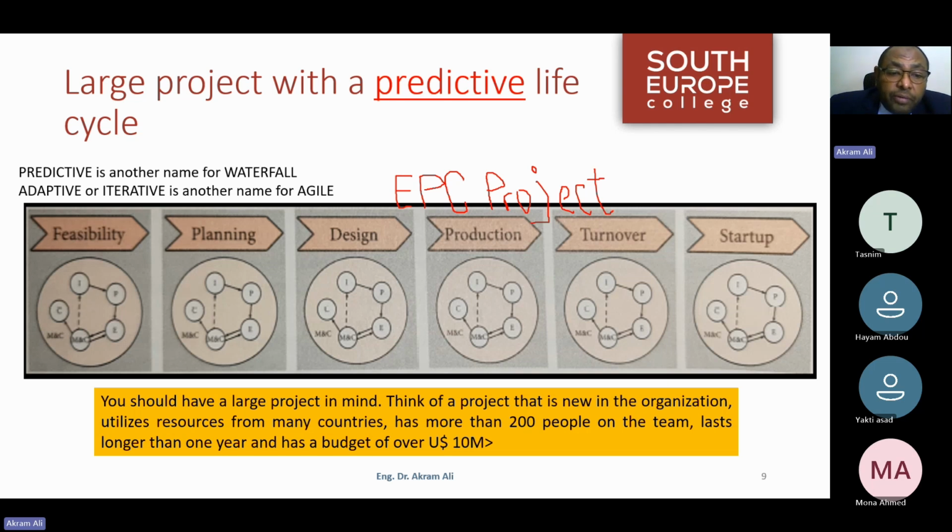So during my FEED design, I understand the high integrity pressure valves, or HIPS, because these are very special valves and they are not available off the shelf; they are built according to my FEED design parameters. So I start ordering here.